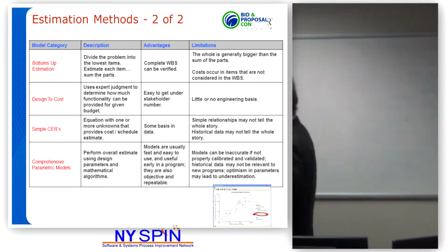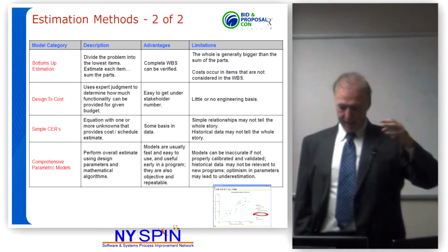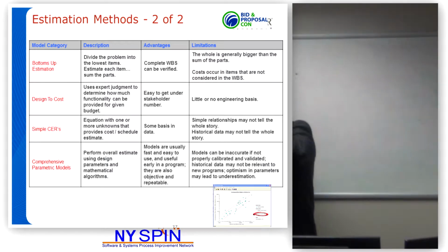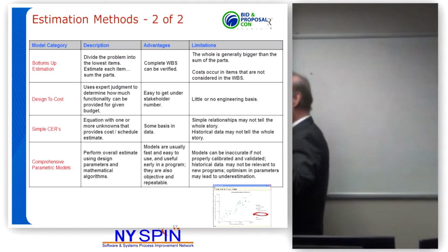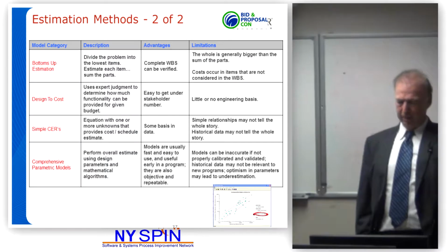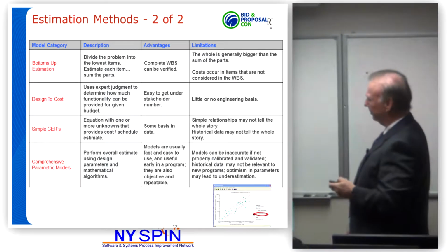Simple cost estimating relationships. If you go out and collect data in your organization, let's suppose you collected time card data and you knew the effort per program and you rated them a couple of different ways, you could use Excel, which somebody probably has, and build a little regression analysis, an equation to say, well, if X happens then Y will probably happen within a range. All better than just guessing.